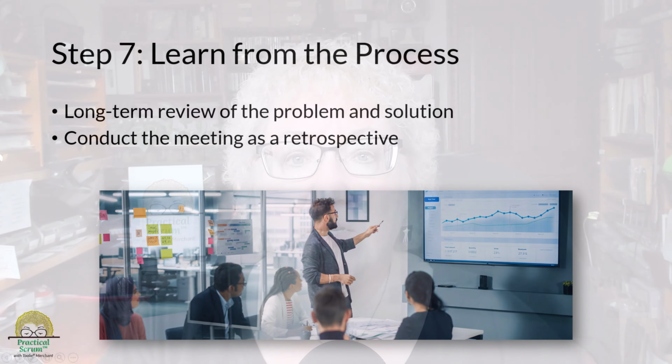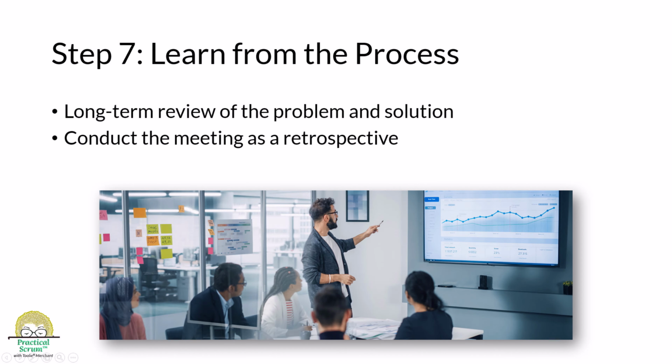Set this up after a suitable period of time, maybe 3 to 6 months, where the solution is established and the associated process has stabilized. Here's where one of our regular types of ceremonies can be helpful. Conduct a retrospective by reviewing the problem, the solution, and any improvements to processes as a result. Feed any suggestions back into the process as a way to continuously improve it.